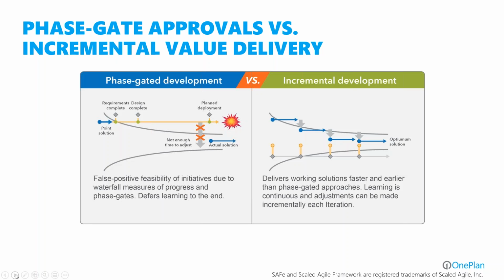Tools and technology, dashboards really help here because you can create visibility so people can see what's going on without having to necessarily sit in a review meeting and waste time doing that. But the key point is agile ways of doing things allow you to avoid carrying all the risk till the end of the project. Phase gate development means you're sort of waiting right till the end before you assemble all the parts and hope everything works out.